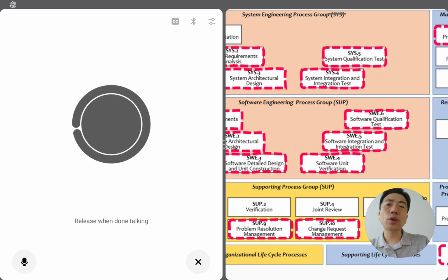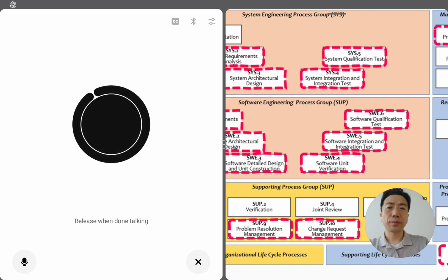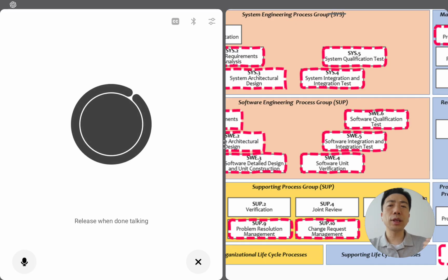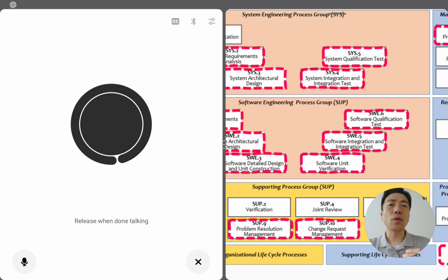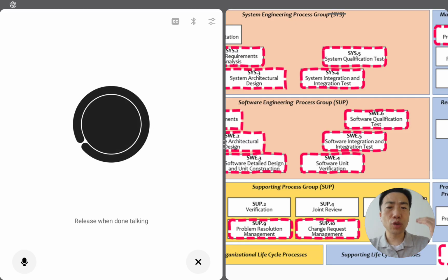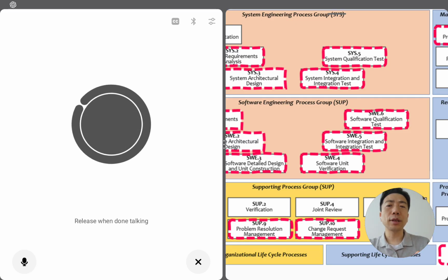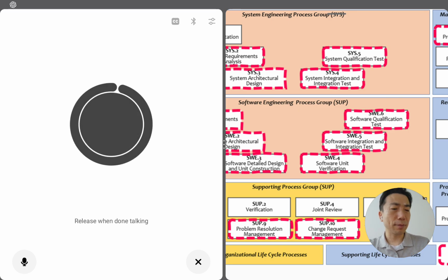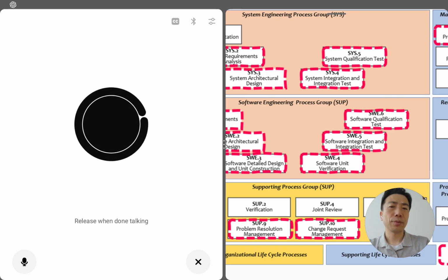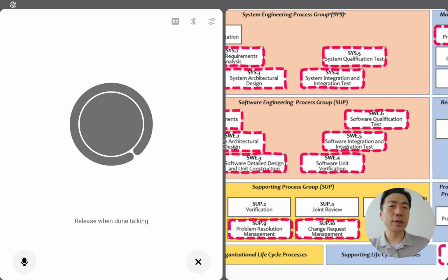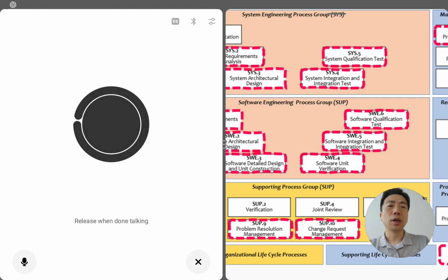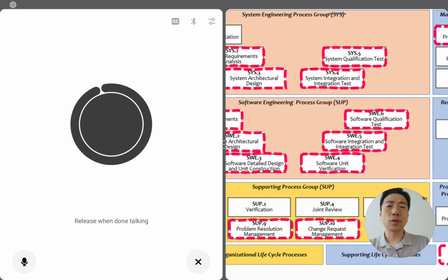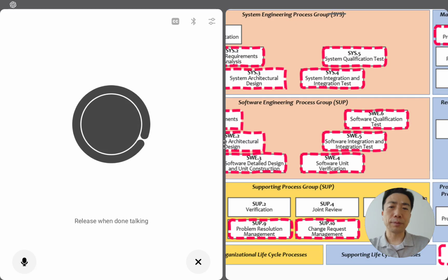The form or ticket showing what changed, why it was needed, who requested it, and when. Second, the evaluation and approval evidence. Notes or minutes from the CCB meeting or system logs showing who approved it.